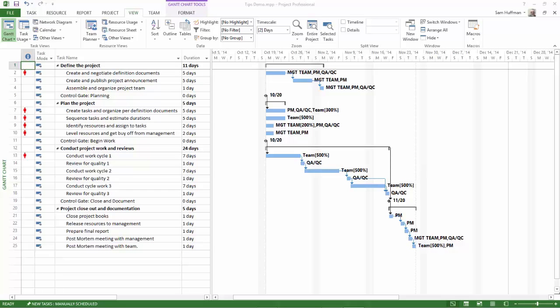First, who has the schedule problem? Well, in the Gantt chart, you get your first hints that you have overallocations. Look for the Burning Man. That's what some people call this red indicator that you see in the indicators field. It looks like a little red man standing there.